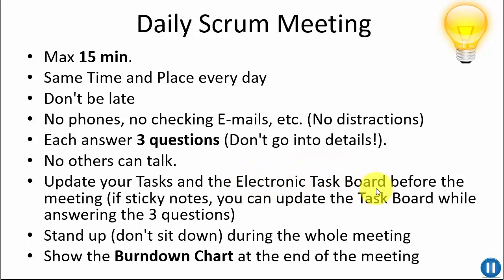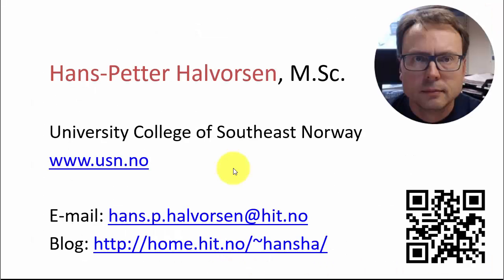If you use an electronic taskboard like I have shown in Visual Studio Team Services, you typically update the taskboard before you go to the meeting. Another thing about the daily Scrum meeting is that all the team members are not sitting but standing up. That's why the daily Scrum meeting is also called a stand-up meeting. At the end of the daily Scrum meeting, you typically show the Burndown chart, so everybody can see the progress of the project. That's all for today, so good luck with Scrum.